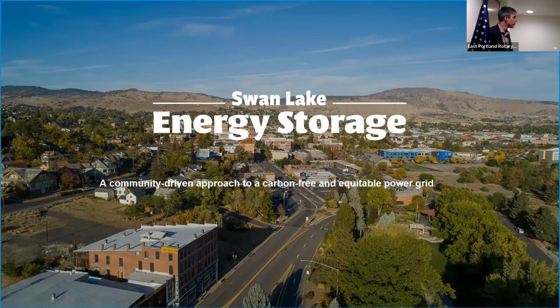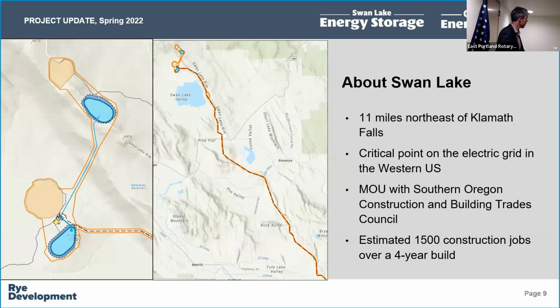We hope to have full notice to proceed with construction from the Federal Energy Regulatory Commission about 12 months from now. Once we begin that process, it's a 4-year construction project. 1,500 to 2,000 new jobs will be created in Klamath Falls, and a large new tax base associated with the project as well. I've got a map here to take a look at where it is exactly.